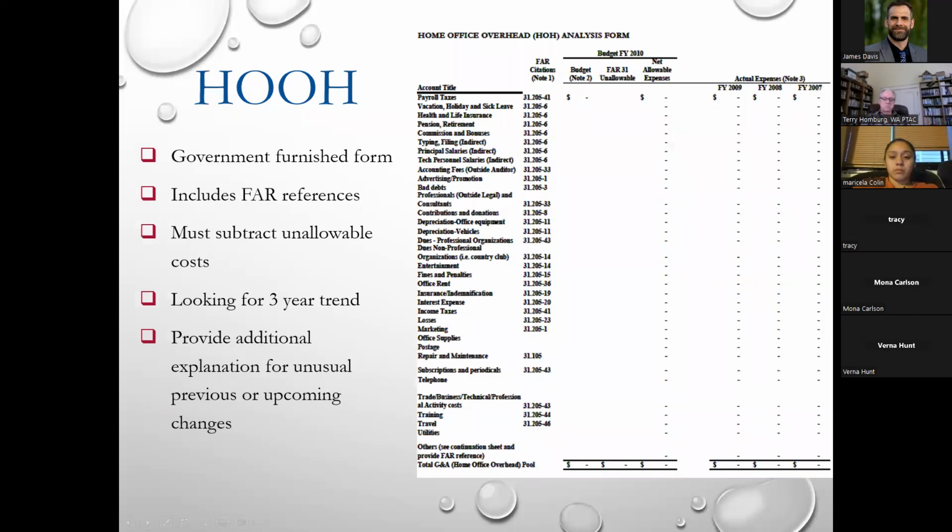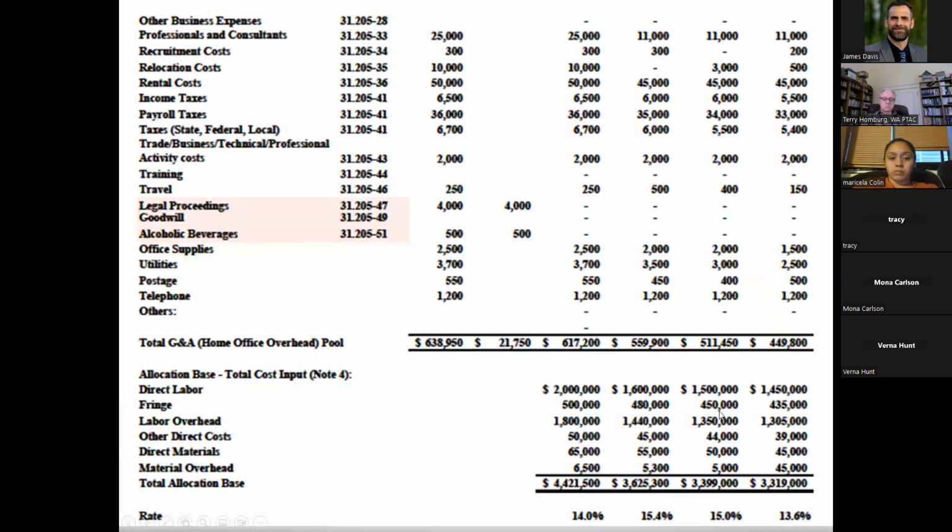When you move to this form, you're going to say, what were my actual expenses for, again, my home office, and I'm going to divide it by my revenue. So my number is going to be really high. Right now, I have no business. I have no revenue coming in, or I have very limited revenue coming in. So my overheads, of course, are very high.